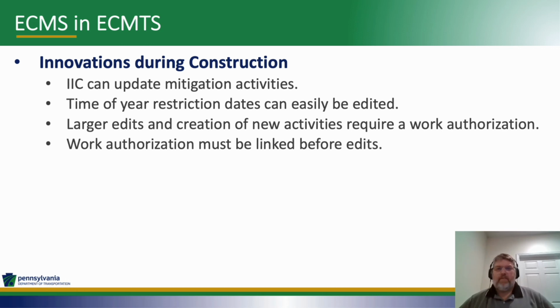So time of year restrictions, we sometimes get a waiver from, for instance, the Fish and Boat Commission to change the time of year restriction. Maybe take 2 weeks off of it at the end so we can start construction a little bit earlier. Those edits can be made really without any special permissions by the IIC in the system. However, there is a possibility to do larger edits, either to change or update something that happened that needs to be addressed during construction, or to actually add an entirely new mitigation item.